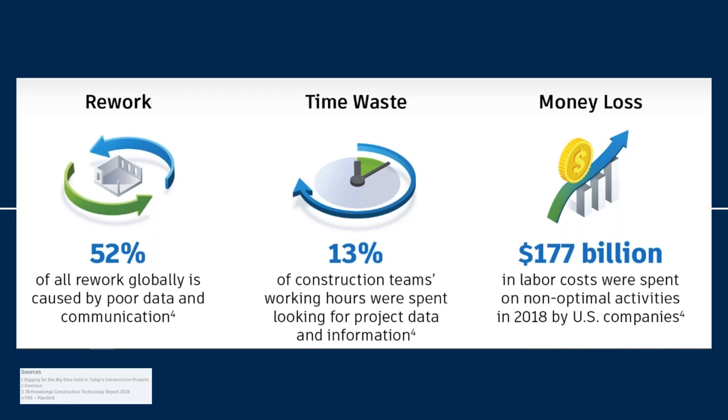I would imagine that in South Africa it's probably even worse. But 50% of global rework is basically caused by poor communication. 13% of the construction team spend their working hours looking for information. Now, if this is an American stat, I'm not quite sure what the South African one is, but $177 billion in labor costs were spent on doing non-optimal activities. So basically, focusing on the wrong thing.